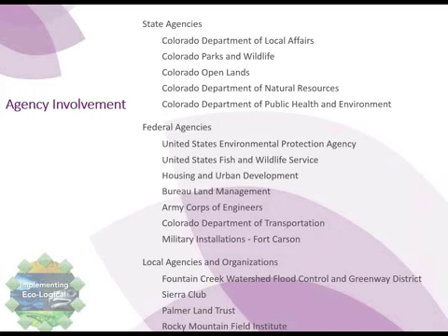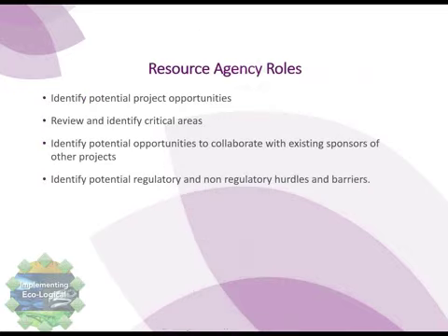I would like to say that we sent out letters to all these agencies and they jumped at the opportunity to participate in our process. However, any multi-agency collaboration process is never really that easy. Out of the 17 agencies listed here, we got consistent participation from about 10 of them. The reason for this is because they're all really busy and this is outside of their normal work stream. Local agencies were also really suspicious of somehow federalizing their local projects, and so they were somewhat reluctant to participate initially. What we ended up doing was meeting in ways and locations that each of the individual agency representatives preferred. In some cases, that meant going to their offices when they had free time and canceling our own meetings.